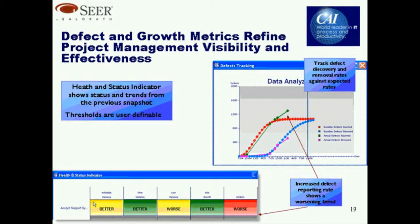One way to come up with metrics is to use what's called the Goal Question Metric approach: identifying the organizational goal — perhaps to reduce the overhead costs of people using a particular application — then the questions that must be asked to determine that, and then the metrics that are used and collected to see if you're meeting the goal. So by looking at what the goal is, what the questions are that you want to answer, and the metrics that can produce those answers, you can end up with metrics that are useful. Some people say just collect everything, but that's usually a problem. When somebody collects everything, it often means they're not going to focus on anything — they've got mounds of data they can't do much with. Also, people respond to what's being measured. If you measure everything, people won't really know what to respond to. If people are being measured on defect insertion and removal rates, you'll see fewer defects shipped. Understanding what your goals are and which metrics measure them is an important factor.